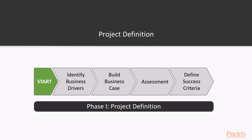Finally we have the success criteria. The key objective is to document what a good solution should look like for the project to succeed and become production ready. We need to clearly define the elements that need to function correctly in order to move from proof of concept to proof of technology and then to pilot phase before finally deploying into production. You need to fully document these elements and get end users or other project stakeholders to sign up to them. It's almost like creating a statement of work with a clearly defined list of tasks.